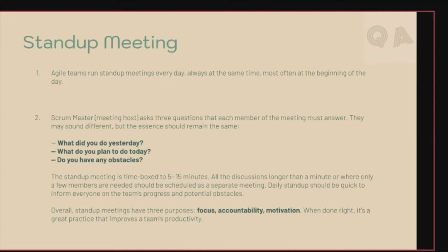Let's start with the stand-up meeting. In agile methodology, the stand-up meeting is a very common practice which always happens at the beginning of the day. It mainly focuses on three major factors: what the team member has done yesterday, what they're planning to do today, and if they have any obstacles or hindrances they can share with the team. The stand-up meeting is time-boxed to 5 to 15 minutes, mainly to inform everyone of the team's progress and to avoid any obstacles.